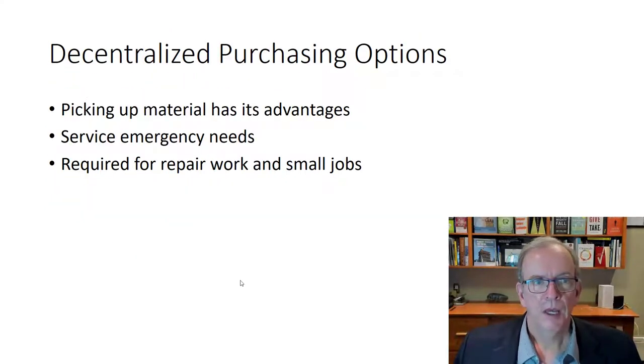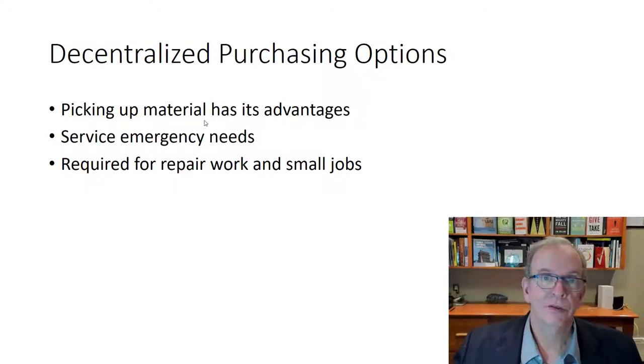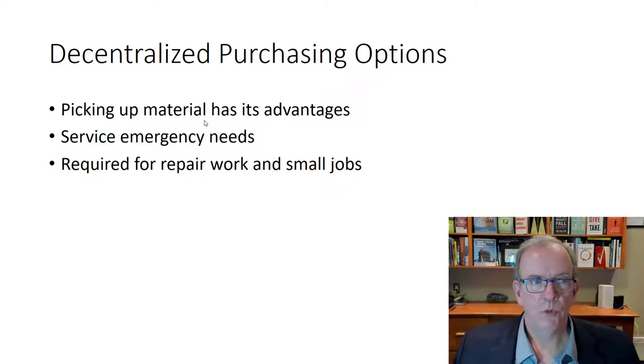All right. Also with decentralized purchasing, picking up materials can be quicker. You're just going to send somebody to pick it up. You don't have to deal with purchasing, and that can be easier that way. But you want to limit how much stuff you're picking up that's not been delivered where possible, because that can be a waste unto itself. Not that you don't need to do it at times, but you don't want to make that the way that you do things if possible, unless it's very small projects that it makes sense for.